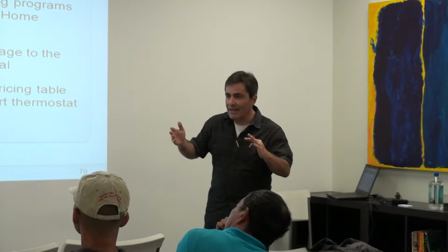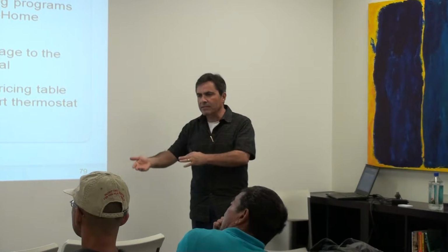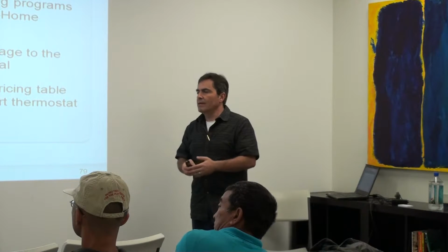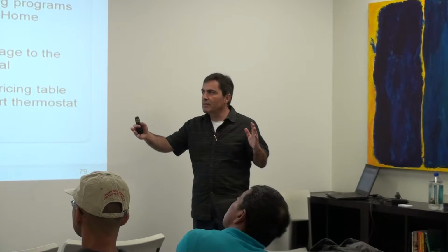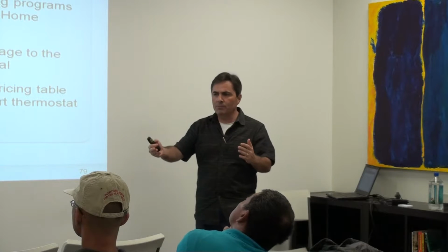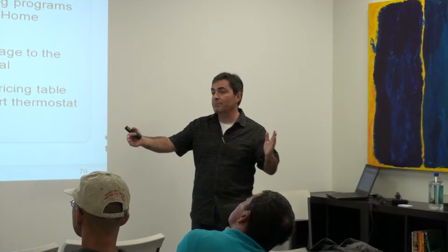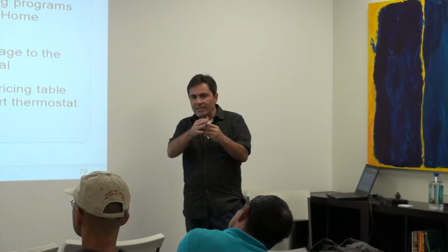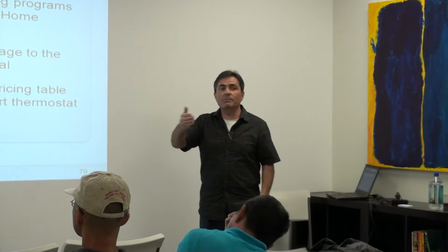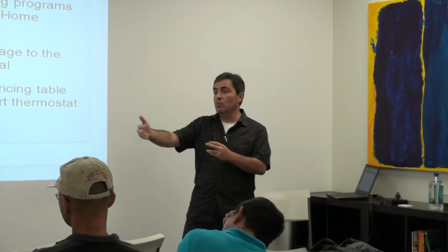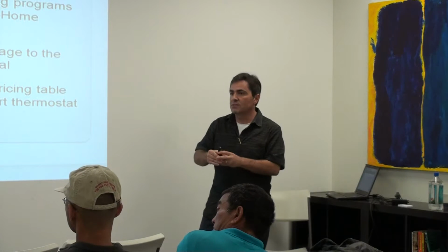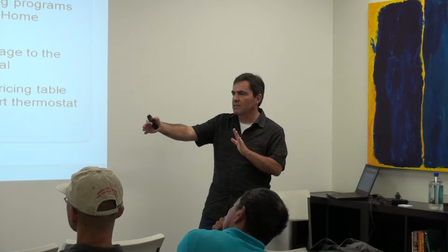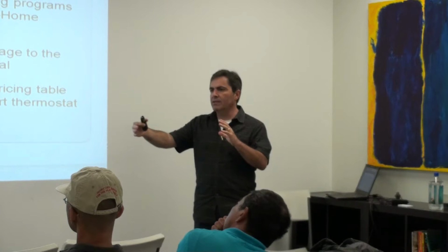Anybody guess what? Well, you have to get an acknowledgement that you have enough credit, and then you can actually make the full payment. And there's probably other steps I'm missing, but the whole thing of making a credit card payment turns out to be maybe 15 steps. So you can take multiple of those steps, and each one of those steps is pretty small. It could be maybe 1 day of work, half a day of work, maybe one of them would be 2 days of work.